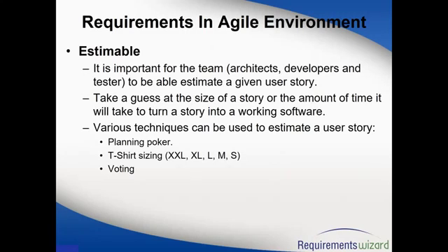It's showing in the video t-shirts and how they are doing estimates with the t-shirt method. Okay. Everybody is in a sprint planning meeting, right? Yeah, in the planning meeting. It was all about the grade, how to build the system, and if it is an update to the grade, then one person is showing small, one is showing small, one is showing medium, and another one is also showing small, and they are deciding why you chose the small size, why another person chose the medium size, and they are doing the estimation that way. Yes.